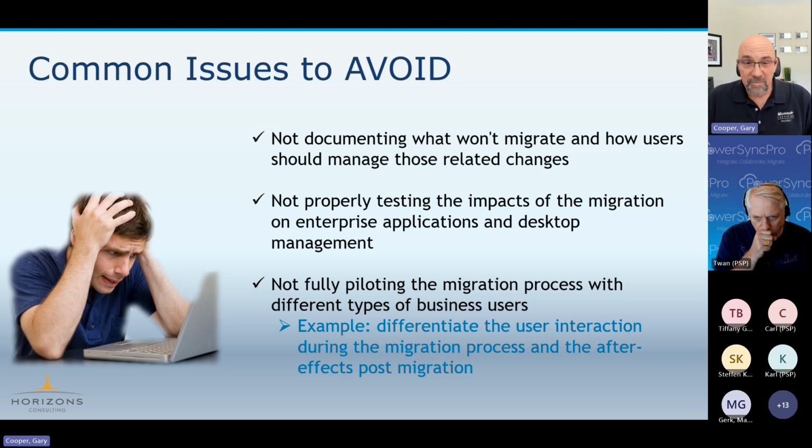Not testing the impacts of a migration on your applications and desktops is another one we've seen a lot, where the users get upset when the applications no longer function properly. And then not fully piloting your process. Something you're going to see with piloting is that it's very common for us in IT to use other IT users as our pilot. That's great for the first round of pilots, but it's not good if that's your only pilot. You need to include business applications and business owners in that pilot list.